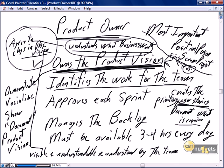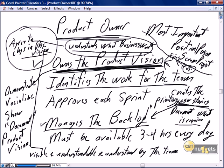The product owner prioritizes the user stories. For example, there may be 36 user stories in the backlog, but these five are the most important — these are the user stories I want you to complete in the next sprint. That's what we mean when we say manages the backlog: takes the user stories, prioritizes them, and defines what's in a sprint.